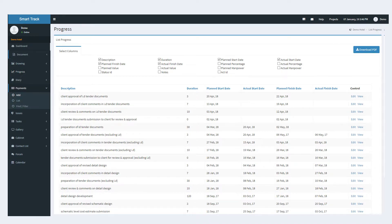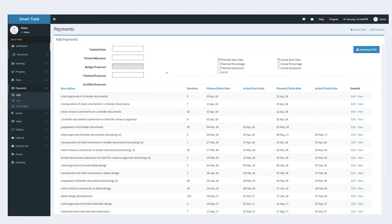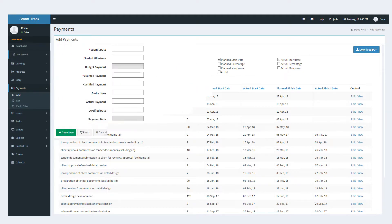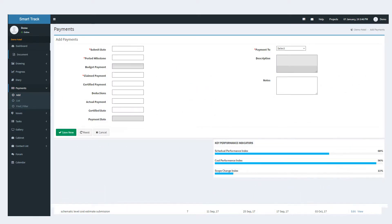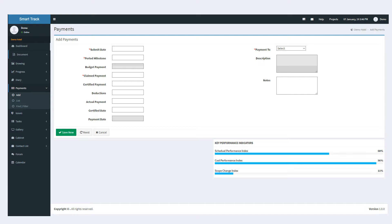The finance slash payment module facilitates in preparing and streamlining the payment requisitions such as budget, claimed and certified categories of payments. It also provides a database of the deductions made and the due dates of payments.